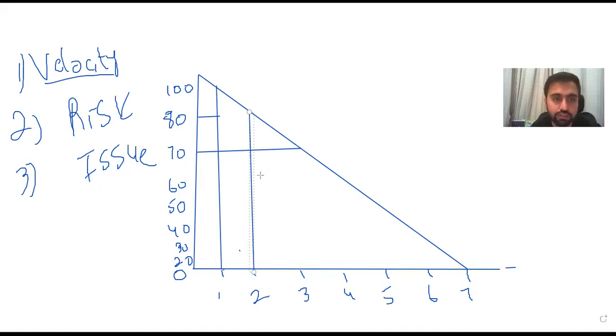In actuality, if the team is going very well, on day 2, instead of 60, we have reached from here to here, so we have reached 60 story points. So in this, we can easily see the variance between the planned and the actual. Where do we stand? So this is a burn down chart showing that our progress was even better than what we actually planned for.